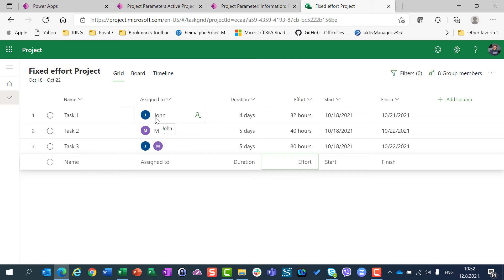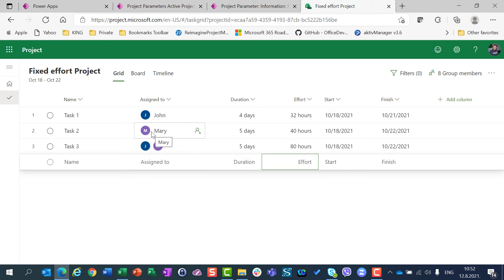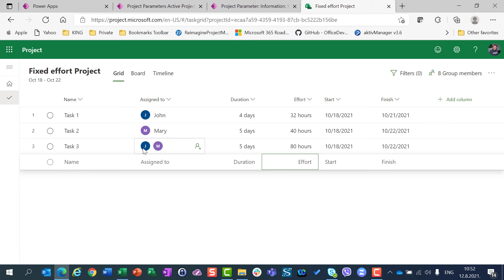Since John, according to his calendar, works 8 hours per day and needs 32 hours to complete his task, 32 hours divided by 8 hours per day results in 4 days. Same for Mary — she works 8 hours per day and needs 40 hours, so 40 divided by 8 equals 5 days. When John and Mary are both on Task 3 and together need 80 hours, since both work 8 hours per day, John works 40 hours over 5 days and Mary works 40 hours over 5 days, totaling 80 hours — so the task duration is 5 days.